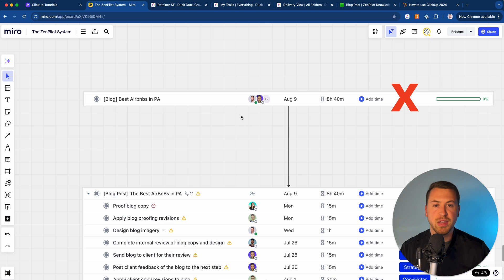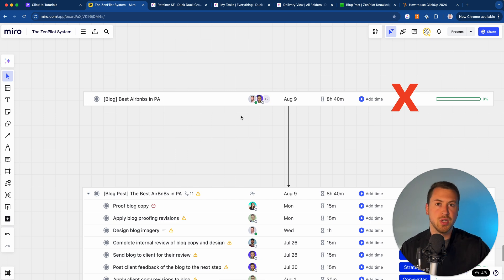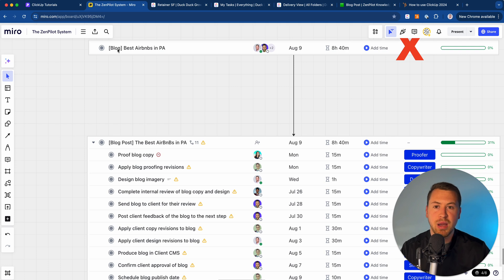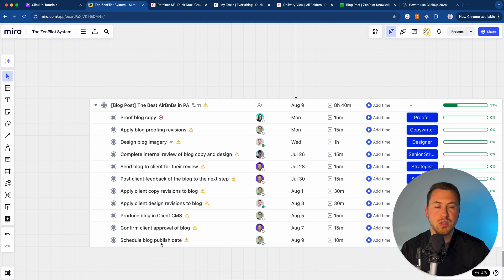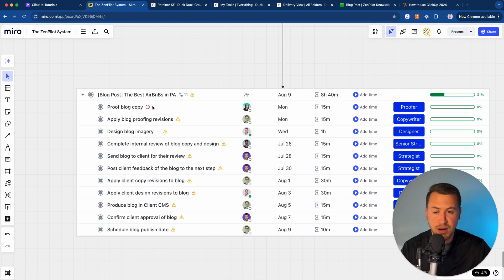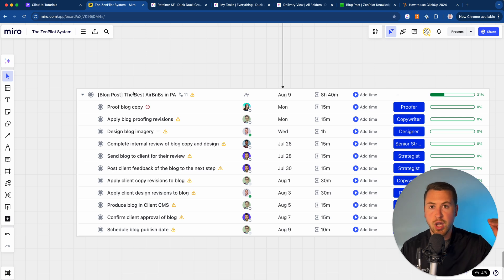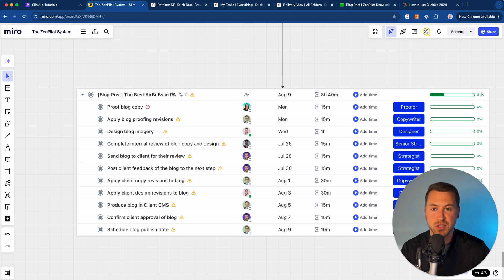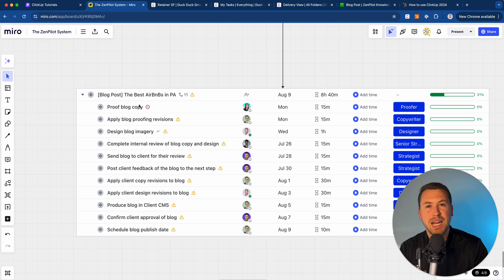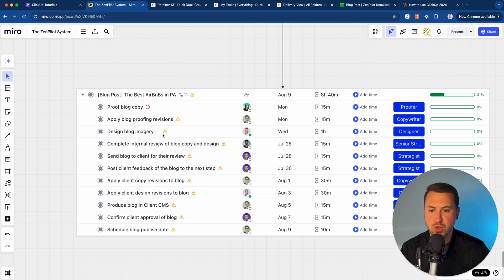The best way to solve this issue and the way that you need to structure your tasks — to really make sure you get good workload and capacity visibility, understand project progress, and make sure everyone knows what they need to do and how they need to do it — is to take that specific parent task and break it up into different subtasks. It's the same exact parent task, but now this is basically going to be used to group up all of the work that actually needs to happen to complete that specific deliverable. So I still have "Best Airbnbs in Pennsylvania" — that's my blog post, that's my deliverable for the client. But now I break that up into bite-sized pieces: proofing the copy, applying blog proofing revisions, designing the imagery, sending it to the client for review, scheduling the published date, and so on.